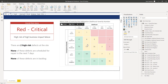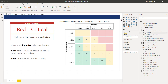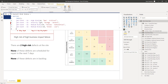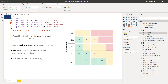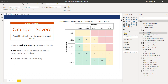Another little bit of testing: I just want to see what happens when we change this overall risk status, because all of these should change. I'm going to change the rules that calculate this overall risk status. At the moment, if there's any work orders in red, the overall status is going to be red. If I change that to greater than 10, it saves — there are no more than 10 work orders in red, but there are high severity ones, so now it's gone to yellow. There are four high severity defects at the site, none scheduled for the next seven days, three are in backlog.